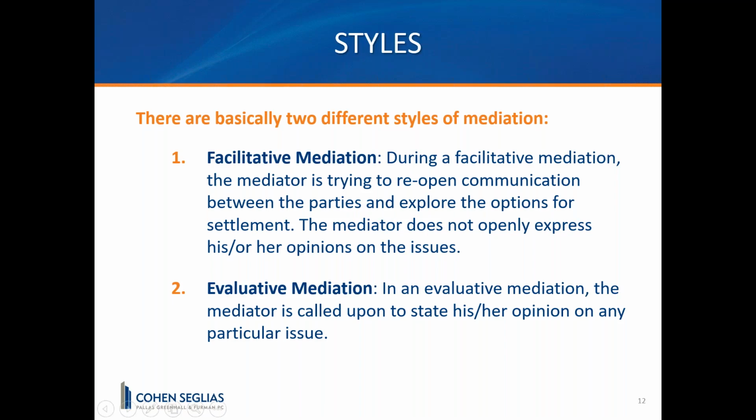A frequent concern when approaching the mediation process is that the parties are often arriving with high expectations and a strong sense of legal certainty regarding the strengths of their own case. And so when that happens, you probably want someone that falls more in the evaluative category, because the mediator can help to adjust the other side's perceptions of his or her claims or defenses.